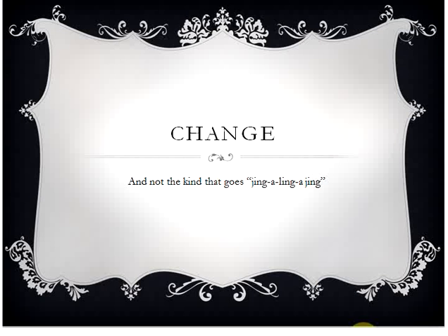So for instance, if the OB nurses that are taking care of newborns want the vital sign assessment laid out a certain way, when that SME comes to the next meeting, the NICU nurses and the pediatric nurses from their department, you're going to have a representative, and somebody will remind them that all three of those departments are using the same document or same layout, and so if you change it for one, it would affect everybody. And so that's the next conversation that needs to be had. How is this change going to affect everybody? Let everybody have a chance house-wide, but still in a controlled environment, have a say.